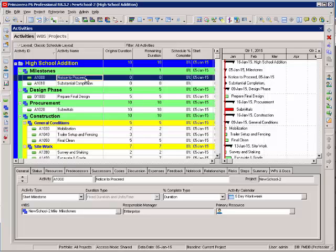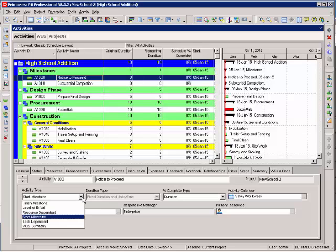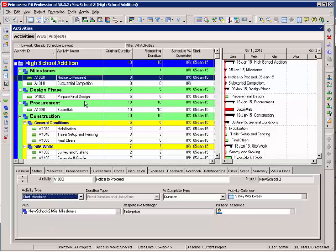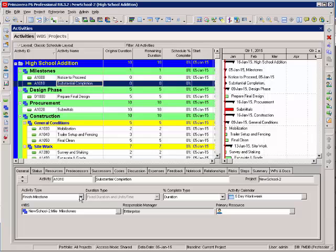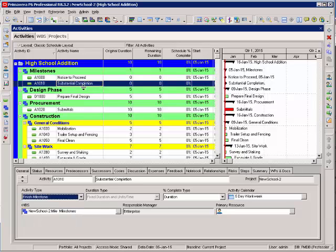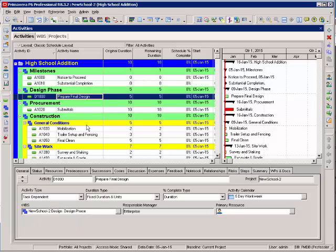Now that your activities are entered, let's look at some features for the activities that you've entered. Make the notice to proceed a start milestone. These are milestone activities, so we want to set substantial completion as a finish milestone. The rest of these activities will be task dependent.